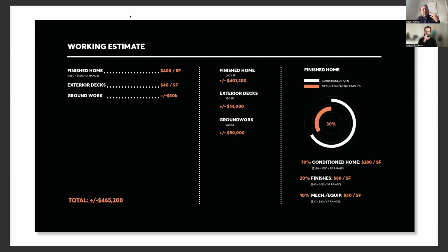We can start to say, well, we know that the dining room nook and the lunchbox storage is key and a requirement, and that has to be there on the pricing. Maybe that means we're coming down market in some other selections. And we can play with those dials a little bit and say, these are really important, high priority. Great. Let's make sure that we account for those. The ramification of that is we need to come down market on this other thing to make sure that that finish allowance still holds up.